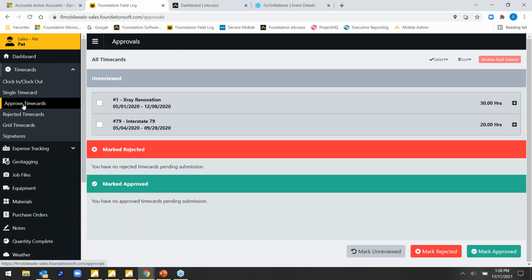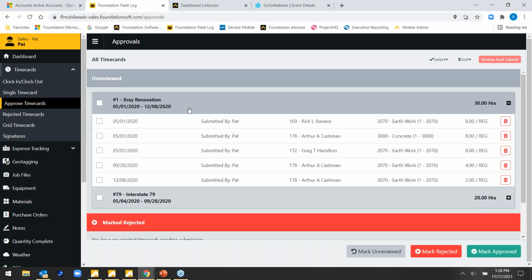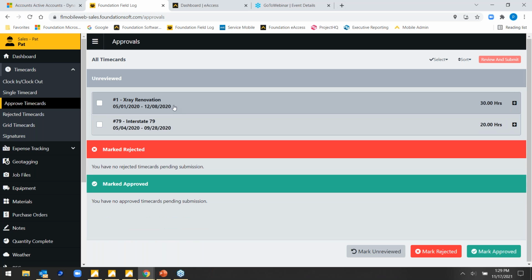with an approval process. So once the time cards are entered, that user can submit to, let's say, the project manager. Project manager can see all those hours. They can recode, they can make overrides, do what they need to do. So always this approval process to allow a second set of eyes on the time cards before they're officially fed into the software to populate the labor.